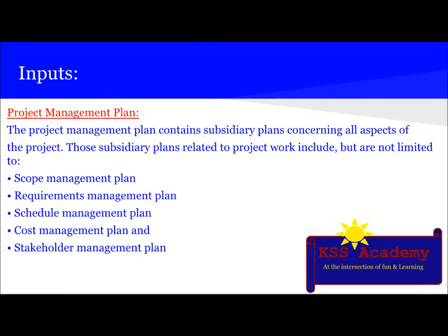The inputs involved are: the first input is project management plan. It contains subsidiary plans concerning all aspects of the project, and those subsidiary plans related to the project work include scope management plan, requirement management plan, schedule management plan, cost management plan, and stakeholder management plan.